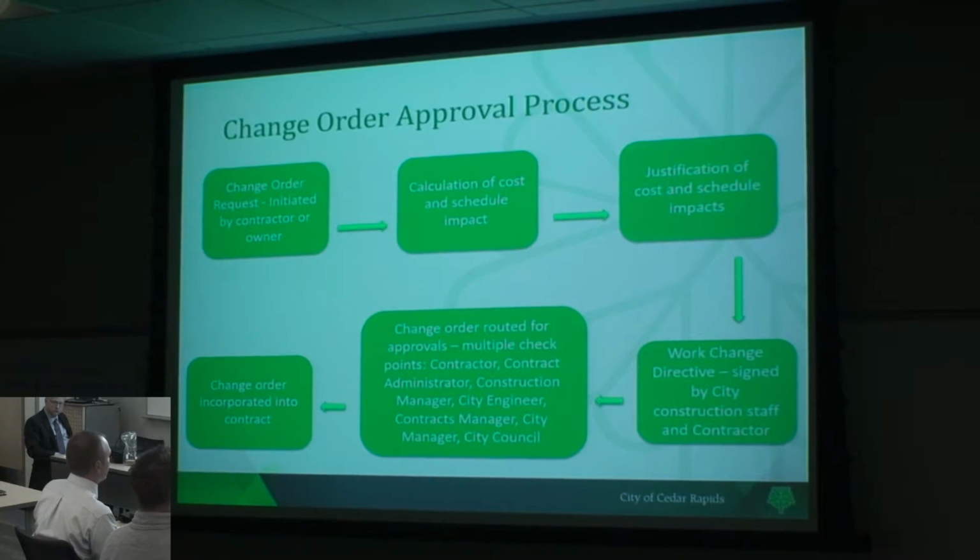That goes through the contractor again, the contract administrator, which is our project manager in-house, the construction manager, which is Justin, myself, the contracts manager in finance, Randy Hartman right now, and then the city manager, and then ultimately the city council. The other sign-off point that we have with any federal aid contract is that the DOT has to sign off on that change order before we can proceed with it. And then once that goes through city council, it's incorporated in the contract, and the actual contract value changes, and if we're adding days, we can add those days or subtract days from the contract.